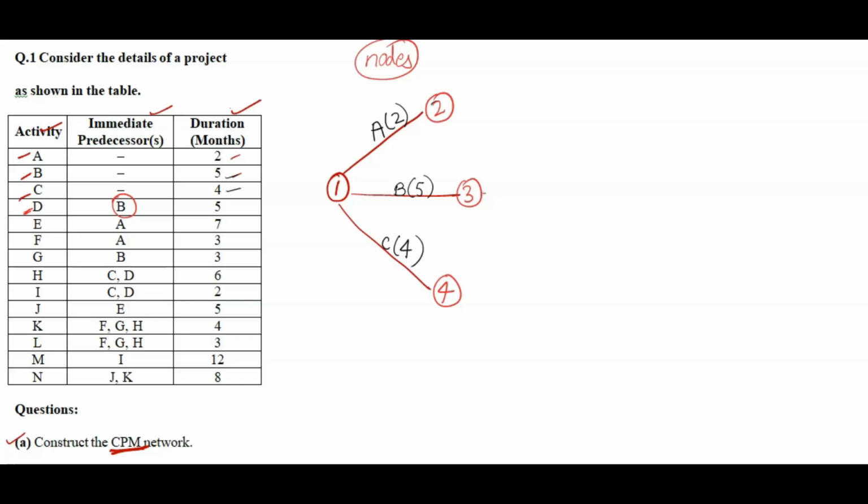One thing is clear. Then there is one more thing we need to check: is this D activity a predecessor anywhere? So you just check in the predecessor column, is D activity there? You can see here CD, here CD. In these two places we have this D activity, and it is connected with C. If that is an individual one, no problem.